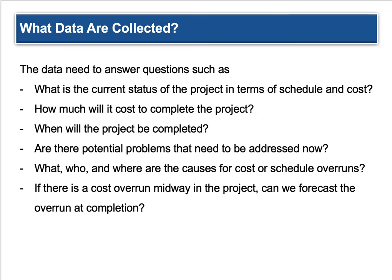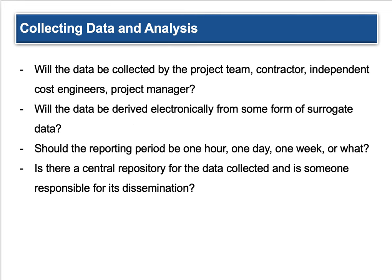When collecting data, ask yourself: are there potential problems that need to be addressed? We went through this in our risk assessment. Then we need to look at who and where are the causes for cost or schedule overruns, and how do we address them. If there's a cost overrun midway, can we forecast the overrun at completion? Is it a one-time cost or ongoing? Our supervisors will monitor this if we do not — they'll ask why we're over budget or behind schedule, so we need the pertinent information at our fingertips.